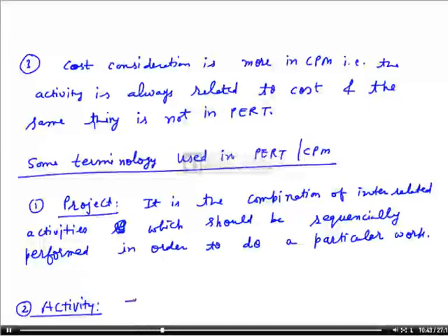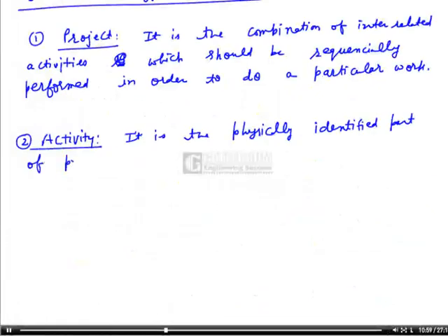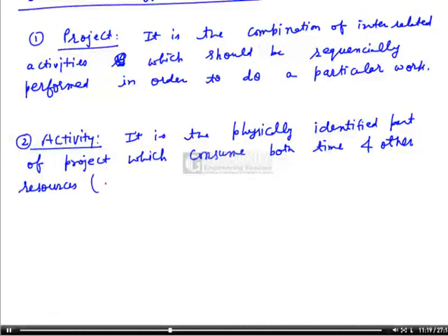So it is the physically identified part of the project which consumes both time and other resources such as man, machine, material, etc.